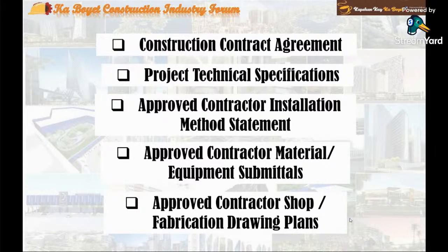As a standard practice in construction and as required by the construction contract agreement, contractors are required to prepare and submit shop and or fabrication drawing plans for review and approval by the project architect, engineer, and or the consultants prior to commencing any relevant work activities in the project. Shop drawing publications,